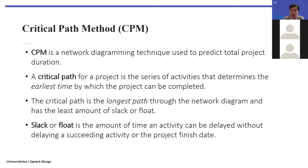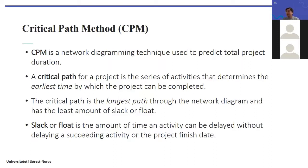Once you can visualize the activity sequences in a diagram, a common analysis is the critical path analysis. You use this to calculate the total project duration. The critical path is the series of activities that determines the earliest time by which the project can be completed. Because many activities can happen in parallel, there may be multiple paths — the critical path is the longest path through the network, and it has the least amount of slack or float.